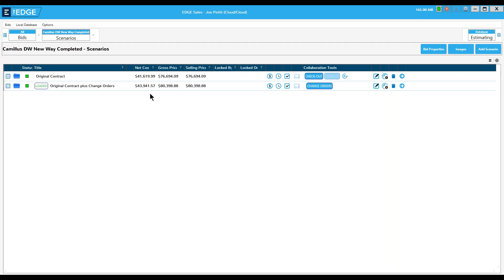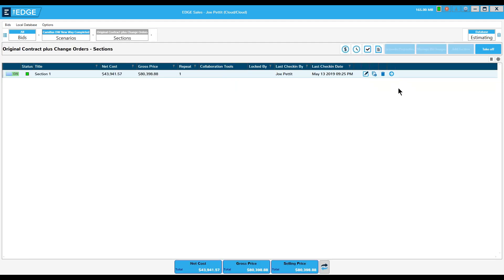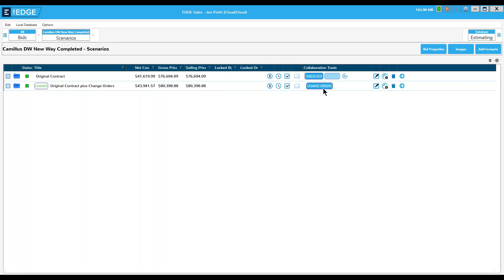Thank you Joe. The first question is from Tommy: can you reverse accepting change orders? The answer is no. If you aren't sure about a change order, don't accept it — just leave it in the created state. But if you need to reverse a change order, you'll have to create another change order to accomplish that.